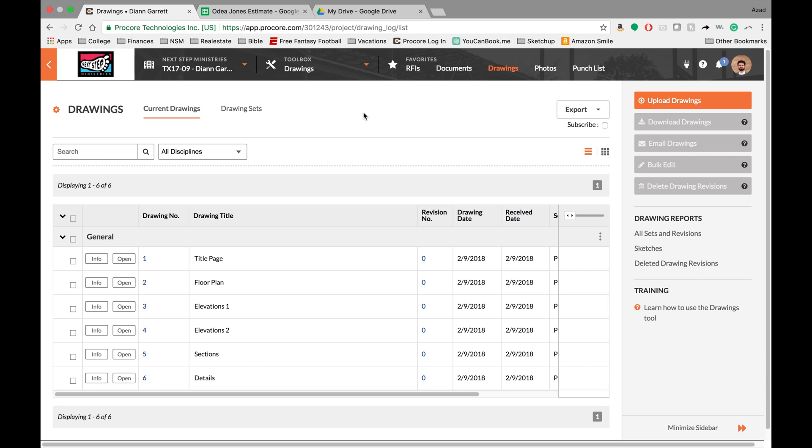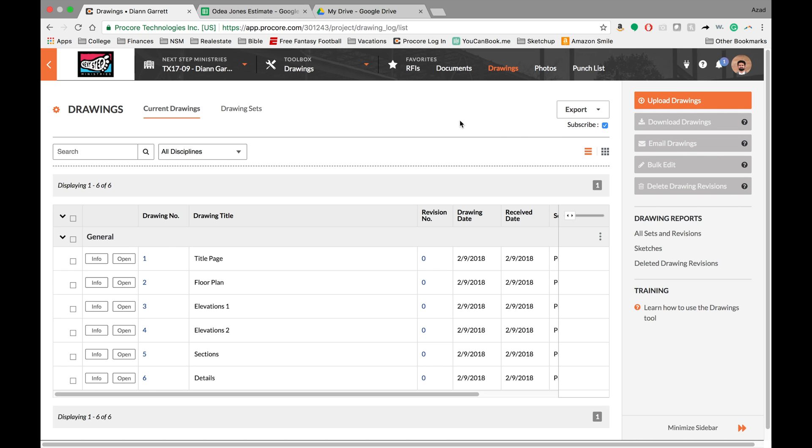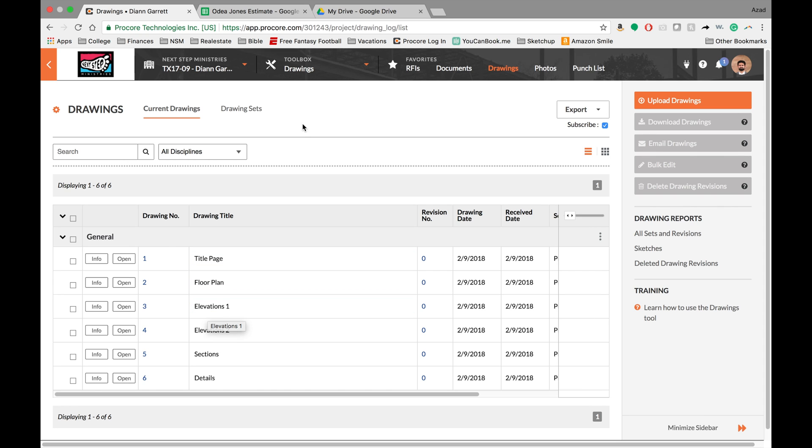So the last thing that I wanted to show you was subscribing. This is a really great feature because it can keep you up to date for your project. So up here, you'll see a little checkbox that says subscribe. When you click this, every time there's a change to the plans, you will be emailed. This is really great if you're out in the field working on projects and your construction coordinator changes the plans or updates the drawings, you really want to know that so you can be working off the most up-to-date drawings. Sometimes they might forget to send you an email or give you a call and say the plans are done. So this is the best way to do that.